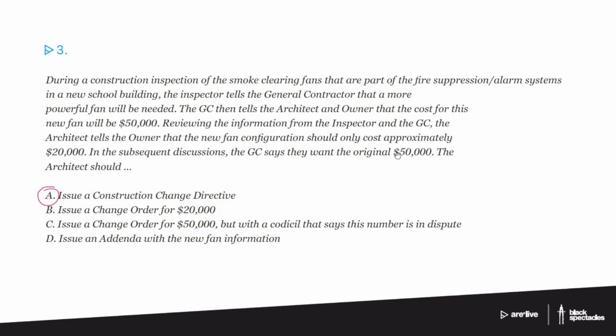Some contracts may say, well, whatever it is, you're going to go to litigation, or whatever it is, we're going to do arbitration. Or maybe it says, we're not going to allow litigation, we're not going to allow arbitration, we're only going to allow mediation. It's pretty untypical to do that. Usually it would be start with mediation and then go to arbitration, and then sometimes they don't allow litigation. So if there's a problem, there's a process that's built into the contracts for how to deal with that problem.